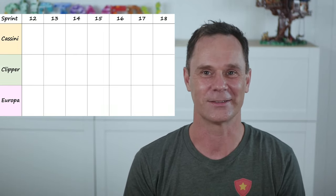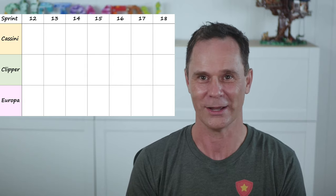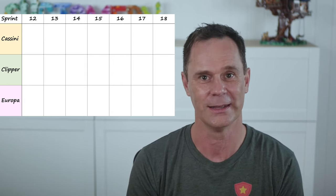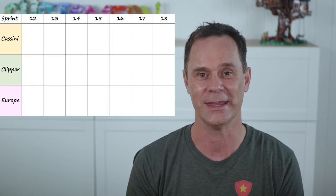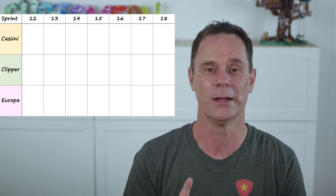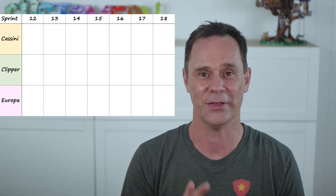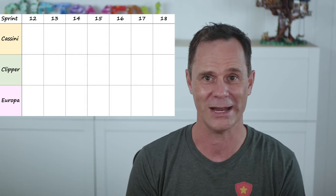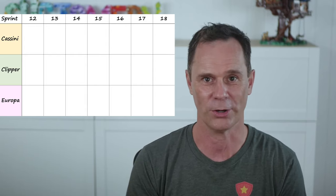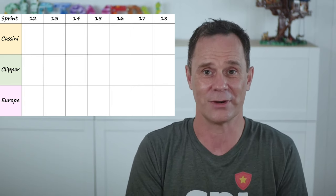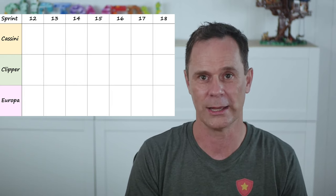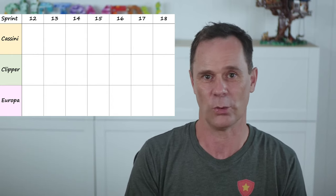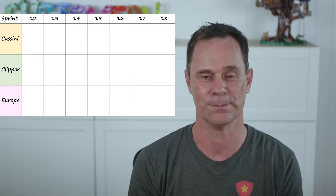Next, add a swim lane for each team working on your project. These could be internal or external teams. In my most recent project, we had the Dynamics 365 team, the MuleSoft integration team, and the Gen mainframe teams. Yours could be a combination of Microsoft customer and partner teams. You might even have three feature teams all working on different parts of a single complicated PowerApps or Dynamics 365 application.